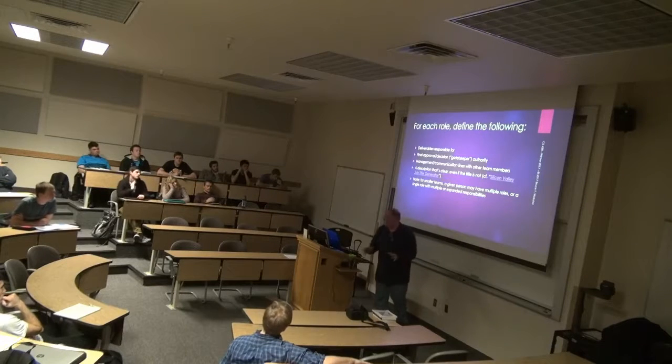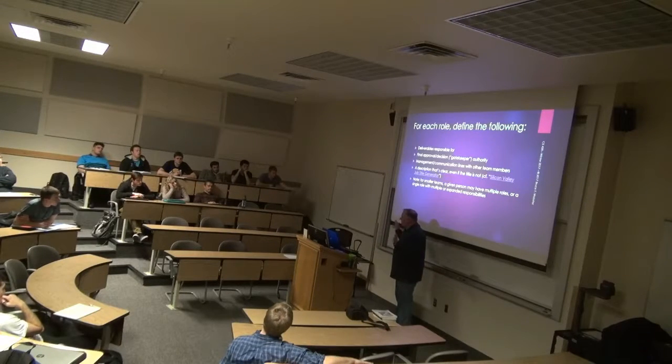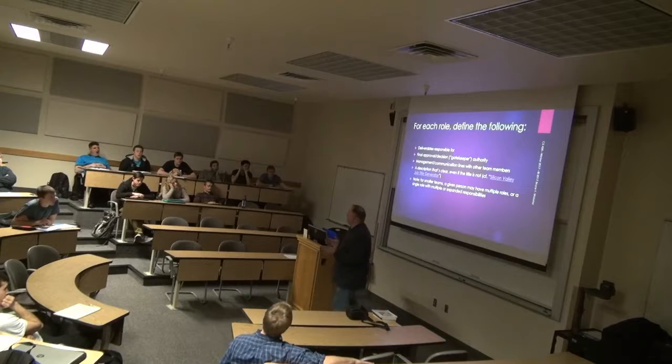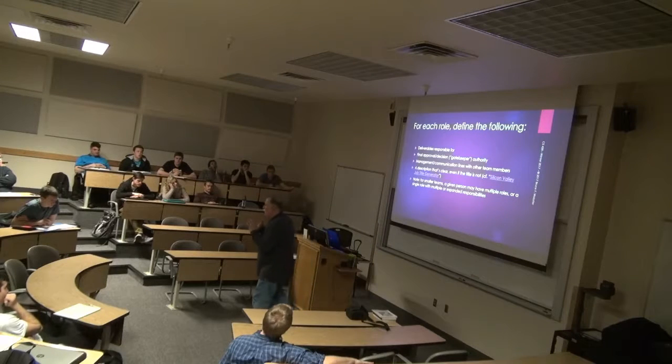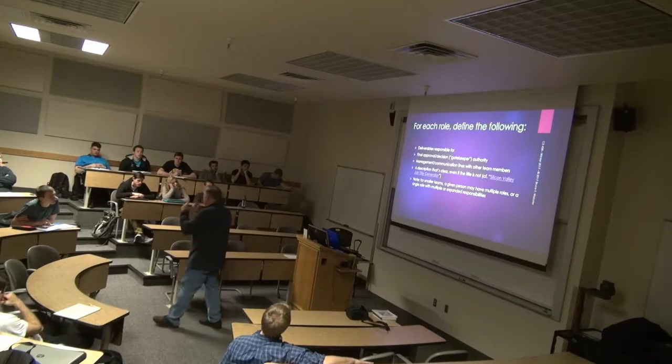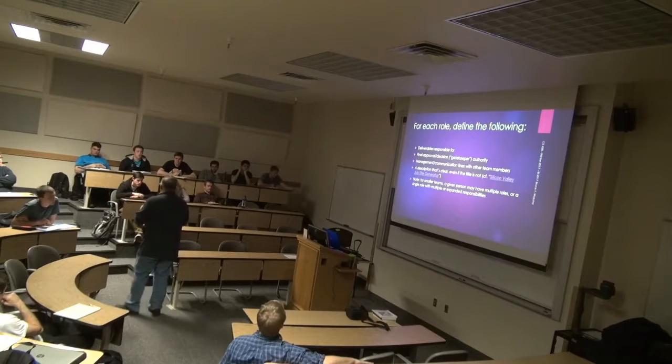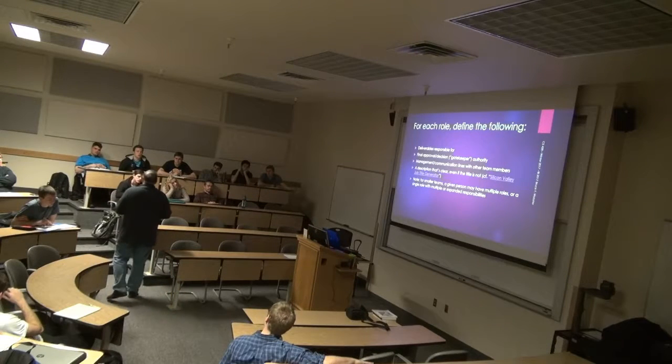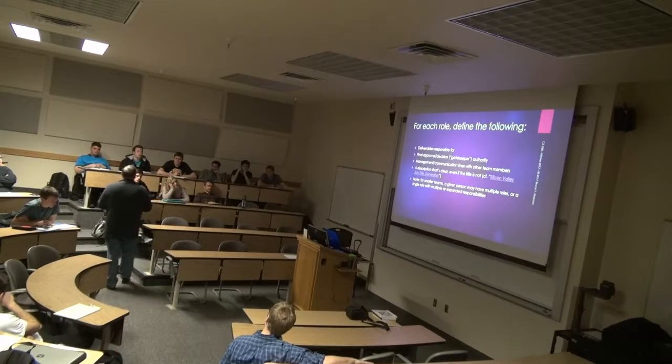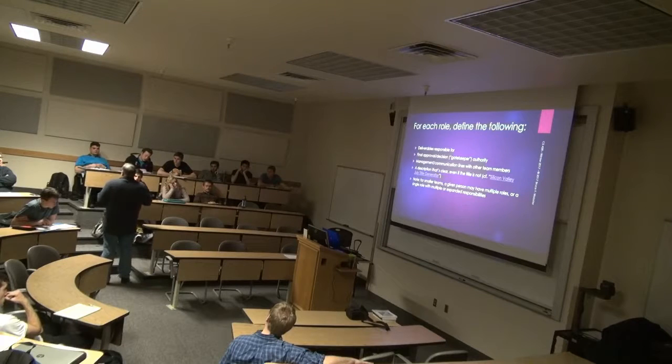But what you want to do is define the roles. You want the deliverables that each role is responsible for. You want gatekeeping authority. Now this is where it becomes distinct. The question to ask for each box that you create on your org chart is, what is this person the gatekeeper for? Meaning the person who has go, no-go authority. If I'm a graphic designer, it's kind of like, I'm not giving you the graphics until I'm happy with it.